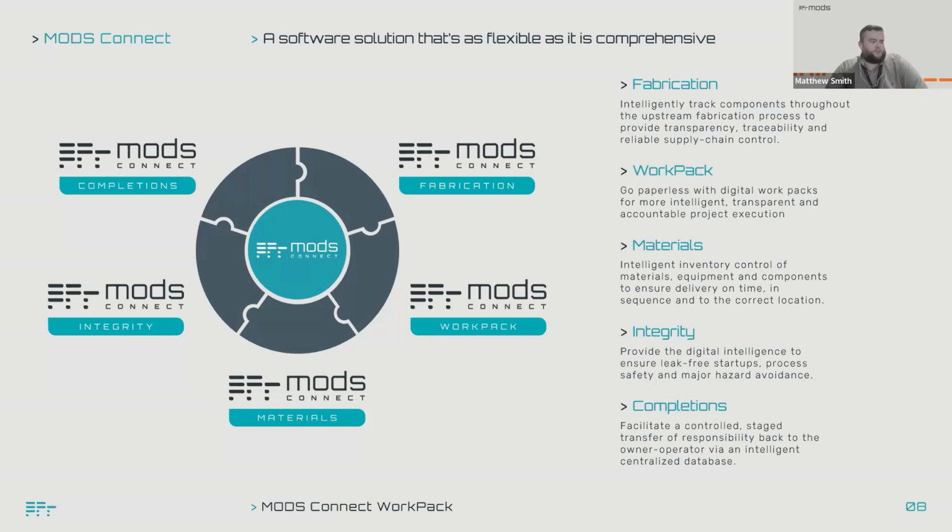We do have some other tools as well, such as also the portals, the links to all the modules, and the reality, which is the 3D. I did notice a question come through as I was talking about the 3D. So that 3D is essentially just visualization. So we take your engineering model file, your 3D model file, and we upload it into the system. We can extract the tags from that file and from that model. And then we can use that to visualize progress and other sorts, and to give data to that 3D model to turn it into more of a digital twin.